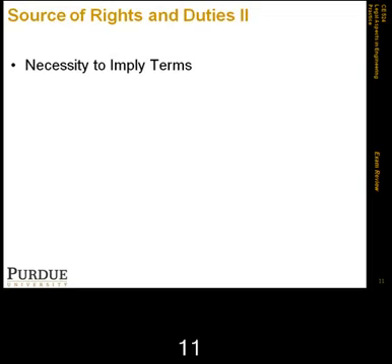But in general, we mentioned that the duty to cooperate should not be one that creates a heavy business burden on one of the parties. Other examples of implied promises that can be found by courts as they are applying terms of the contract include the owner's promise to make sites ready for the contractor, and the owner's promise that the design professional will act reasonably. So this covered the possible types of implied terms that could be applied by courts, and also the need for implying them.